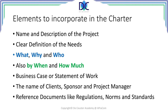In order to describe those needs, we have to say what the project is about. Why do we have to do this project? Who will be benefited from the project? By when will it be completed? And how much will it cost? Projects are also defined in business cases or statements of work. These are also parts that have to be used when we create the Charter. We have to add information about the client or clients, the sponsor and the project manager. Reference documents like regulations, norms and standards may be important for your specific projects, and these elements have to be incorporated in the Charter.